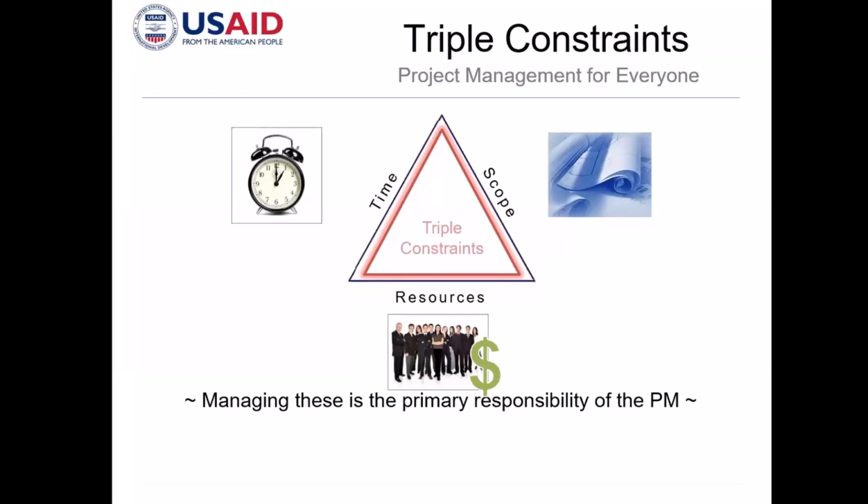You can also have some issues with your scope because sometimes the scope that was initially published will have to be changed because the requirements have changed. For example, the area that a mobile network will serve was previously conceptualized as only part of Luzon, but later on, the owner might decide, oh no, we will also have to cover parts of Visayas or something like that. So scope can change, right?